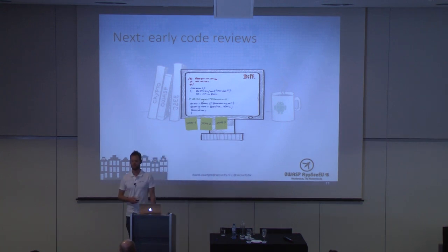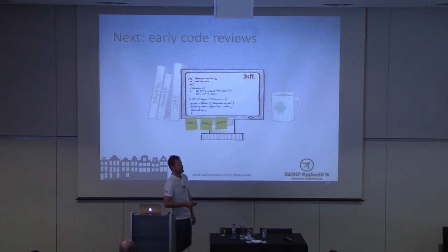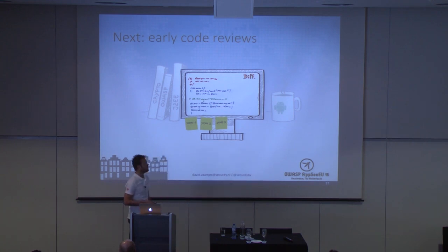So this was working out quite well, and I kept up with this for, I think, 3 or 4 sprints, and then I started to fully lose it, because this is in no way able to combine in your planning with all your other activities, because up front you don't know when they finish a story, right? This can be today and this can be tomorrow. And you don't really know how much time you need to check it, because you don't know how much code is in there. So I needed to cram all those activities into my planning, and I was starting to lose it. So this was a dead end, but from a software team perspective, we were on the right track.